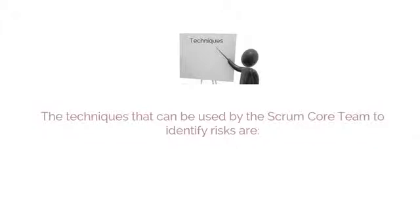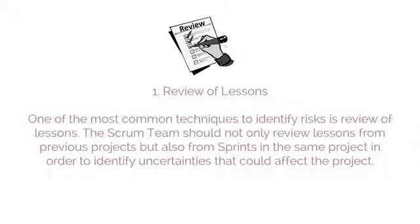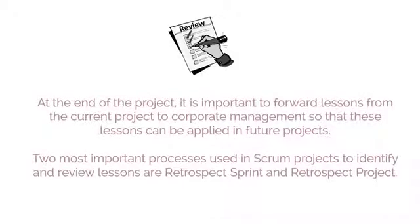Let's discuss how to identify risks. The first technique is review of lessons. The Scrum team should not only review lessons from previous projects, but also from sprints in the same project, in order to identify uncertainties that could affect the project. At the end of the project, it is also important to forward lessons from the current project to corporate management so they can be applied in future projects. The two most important processes used in Scrum projects to identify and review lessons are Retrospect Sprint and Retrospect Project.